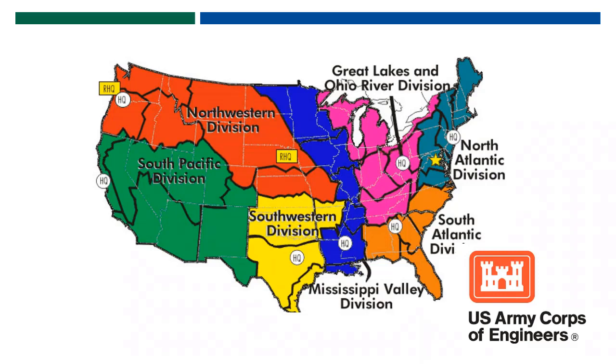And although there are some stumbling blocks in there, such as the 33% restriction within those regional permits, we cannot exceed 33% of a channel blockage when working within a stream. That's one of the quote unquote conditions, requirements within the regional permits. They also have much higher thresholds. And so those impact thresholds are critical to us, because if you can't fit beneath a nationwide permit threshold of X number of acres or linear feet of impacts, and you can't fit under the thresholds for a regional permit, then your option is effectively to pursue an individual permit.